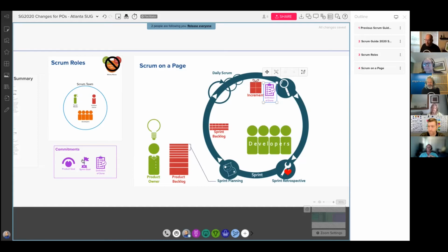So the sprint goal was introduced in an earlier version of the Scrum Guide, and it gave us some wiggle room. The key thing was to meet the sprint goal, not to just get 10 things done. You can get 8 things done and be extremely successful and have delighted customers, even though you missed 2, right? Well, maybe there was something that happened. They worked as effectively as they possibly could. So they removed the word commitment in that sense. It is still one of the Scrum values.